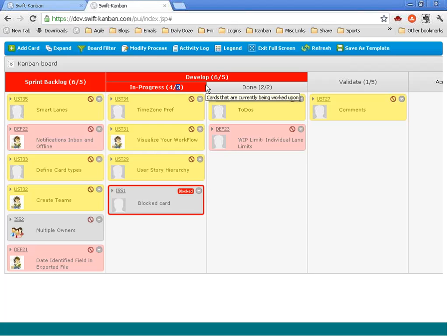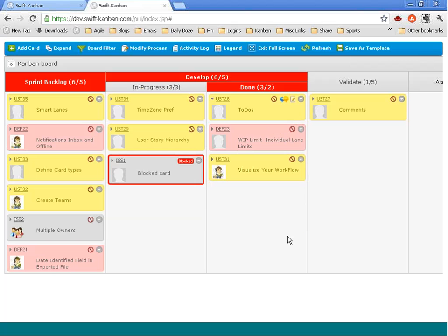So you can define WIP limits, and based on them, the system can alert you whether you're sticking to your work in progress limits, or whether you need to change them because you have more capacity than what you're building up. Each card represents a story or a feature or work item, and a team member, as soon as they want to start on something, can simply pull the card and start working on it.